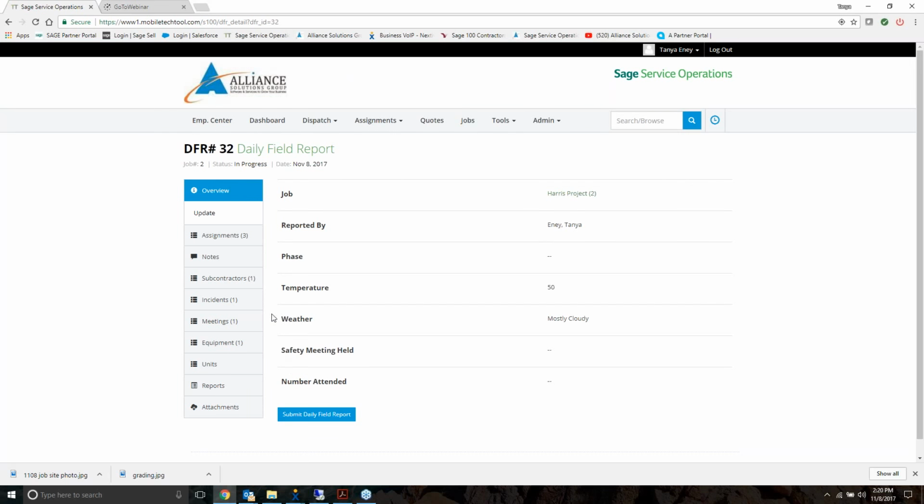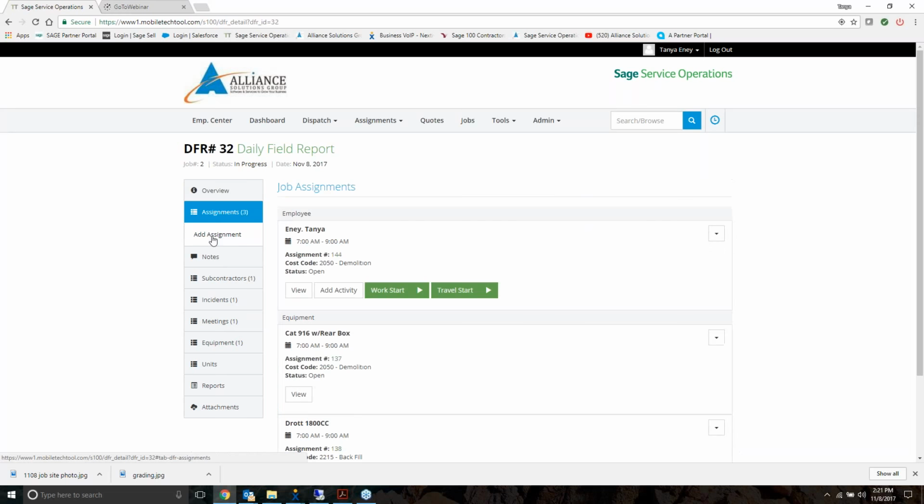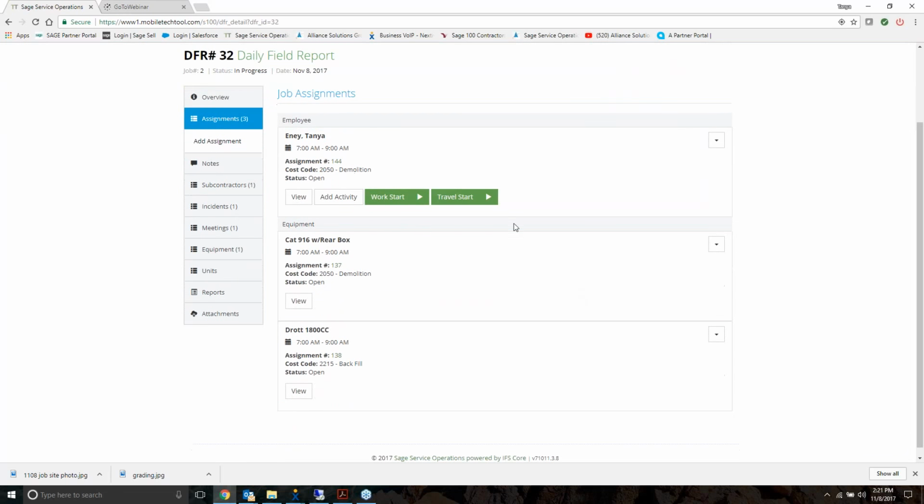So we're collecting a lot of project information, but a lot of times if we have employees and we self-perform work, we also can capture payroll information. So I'm able to record what employees worked on my job site today. I'm able to come in under assignments and either log time or start work if I've created assignments on the job and say, Tanya started working doing demolition, and this is going to now log in against my job. And it's going to pull into payroll, so I don't have to rekey that information.